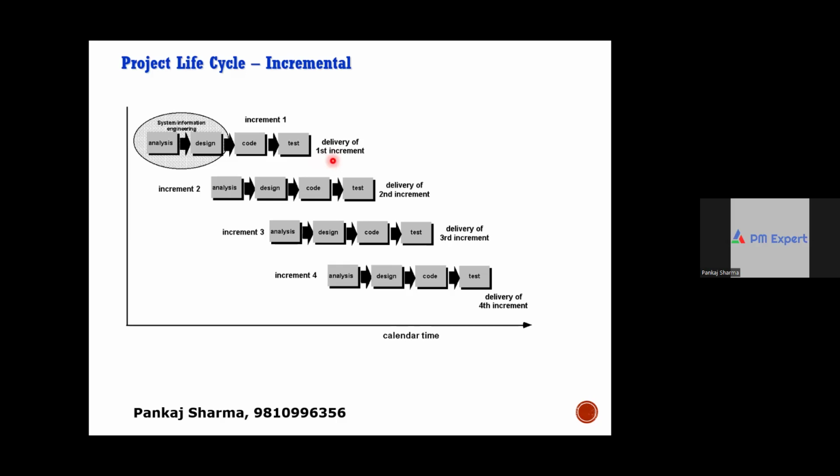Based on the review and retrospection, you can take corrective and preventive action for the successor phase. You can inspect and adapt at the end of every phase. You can refine the plan for the subsequent phase based on the learning from the first phase, and apply that learning in the subsequent phases. So this is the benefit, right?